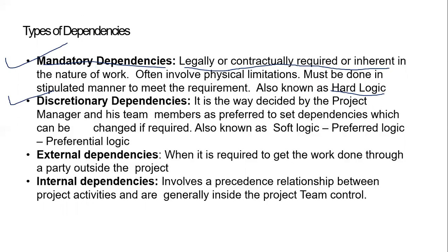There is a discretionary dependency, which is nothing but soft logic. Now this is something which typically happens internally. Let's say, if I'm doing a change request, you might have seen this: okay, you get these things done, and I'll put down the paperwork as we get it. This typically happens on a discretionary basis, depending on the relationship of the project manager to that other department.